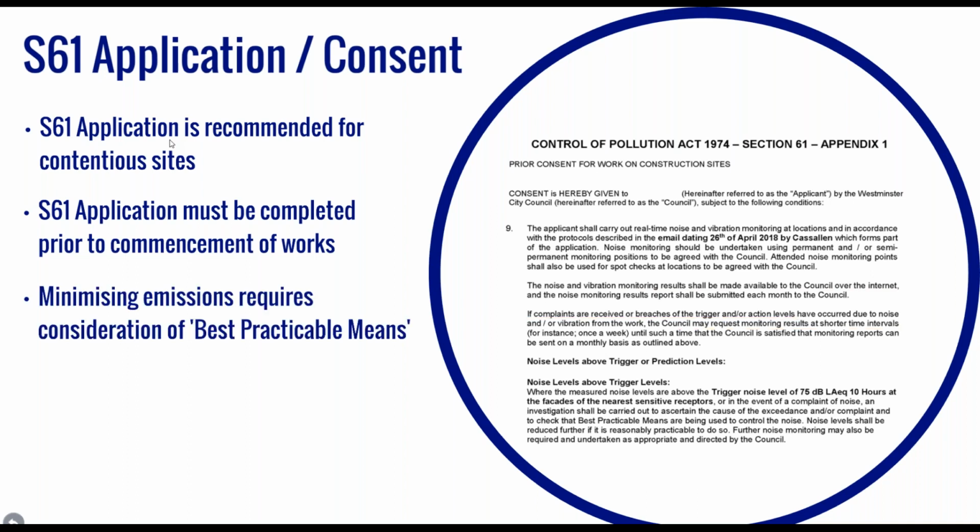Minimising emissions to acceptable levels requires consideration of something called best practical means, which should have regard to both the local conditions and circumstances that prevail at the time, the current state of technical knowledge, and any financial implications of any potential alternatives. The developer's acoustic consultant should be able to provide expert advice in relation to best practical means, which could include mitigation and management measures that could be incorporated to reduce emissions, and if necessary, the consideration of alternative construction techniques.